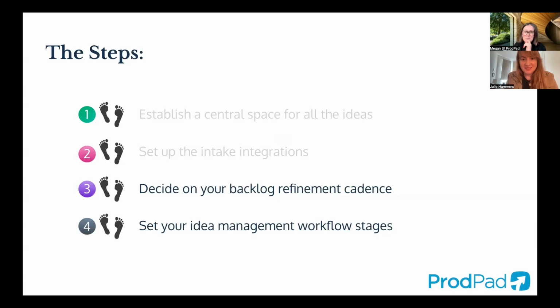Yes. So step 3, how often are you refining and triaging this backlog? It can be the bane of some teams' existence sometimes. It's easy for any type of backlog to grow, and it's there for 12 months, and then all of a sudden you have to just archive the whole thing because there's no way that you're actually going to act on any of these things. Making it a habit is crucial.